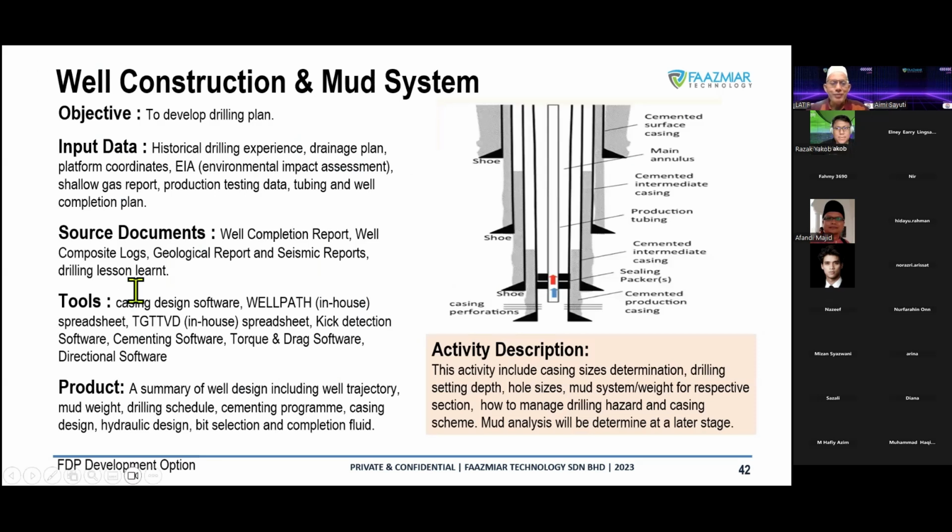Interesting, well construction, because when we do construct a well, it's another skill. So for me, Cik Razak, myself, we are drilling engineers by background. So this is the area where we get involved, getting data, analyzing data, going with the option of drilling, what kind of drilling system we should use, how to really shorten up the time. Because the shorter the well time, the lower the well cost. So in our offshore operation, time is money. So the moment we can reduce time, that's it.